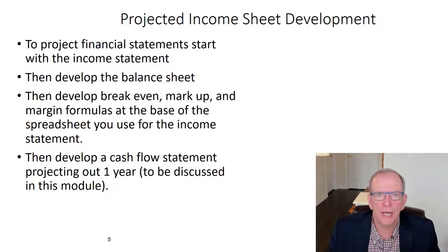So you really have to look at, what are we doing in the next year? If you're a custom home builder, for example, and you plan to build a house, you can really sort of map out with your scheduling software when costs are going to occur, and how you're going to pay that money out. And then you can also look at, how's the money going to come in? Are we going to get deposits? Is this a custom house that we're building for somebody? They purchased the land and they're paying us as we do the work. So how are we matching the money that's coming in with the money that's going out?